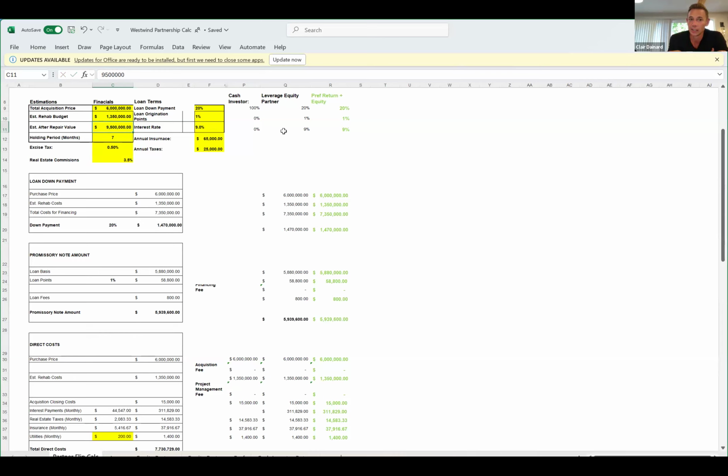Again, he can control his own costs because they're doing a lot of the install and framing themselves. They frame all the houses themselves. They do all the siding and the windows. They install pools. And that's what we were talking about: where do you get cost savings by using your guys? Instead of paying 100 grand for a pool, I'm going to pay 50 grand for a pool. So that's how we're picking up all this cost.